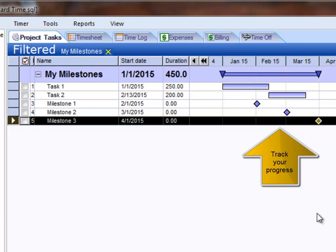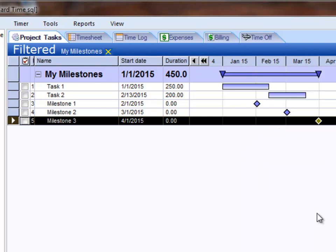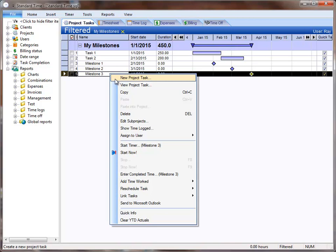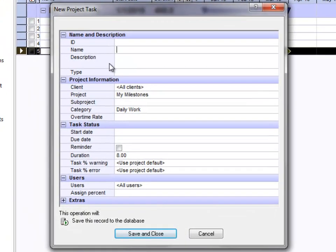You have these points in time where you kind of know where you are in the project. You can tell that you've gotten a certain amount finished and they represent just sort of a stopping point — a point in time where you can take a look at your project and make sure you're really that far along. If I were to right-click on one of these, I could create a new one by choosing New Project Task. It turns out that Milestones are really just project tasks with a zero duration.